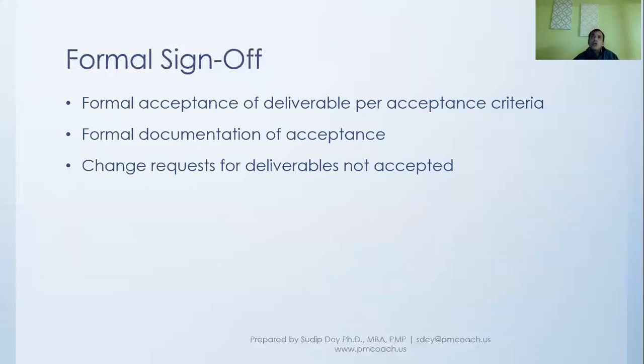Having said that, these are the things that need to be changed. Maybe they'll raise many change requests, and some of the changes we accept, that we will do before it moves to production. And some changes maybe we say no, let's look at this change request as a new project because this was not there in the original plan. And at the end of the day, you come to a discussion and come to an agreement on what is best for the business.